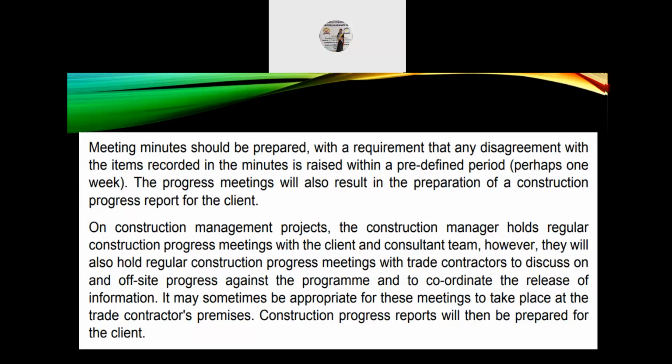So the progress meetings will also result in the preparation of a construction progress report for the client. On construction management projects, the construction manager holds regular construction progress meetings with the client and consultant team. However, they will also hold regular construction progress meetings with trade contractors to discuss on and off-site progress against the program and to coordinate the release of information. It may sometimes be appropriate for these meetings to take place at the trade contractor's premises. Construction progress reports will then be prepared for the client.